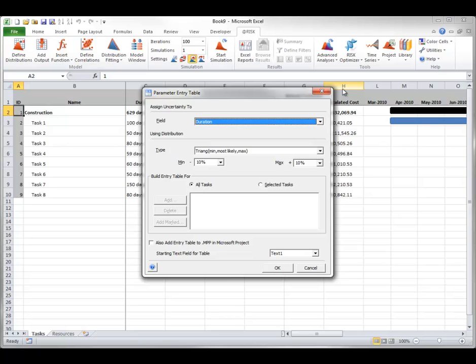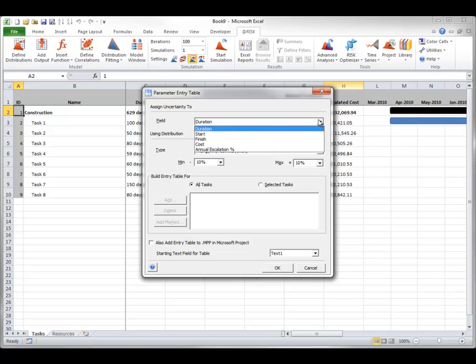The goal is to create columns next to your schedule where you can enter values such as minimum, most likely, and maximum values for task durations or other schedule values. There are a variety of options you can use when creating a Parameter Entry Table. The field drop-down lets you select the type of data you want to enter ranges for — for now, you can select Task Duration, a common source of uncertainty when scheduling.